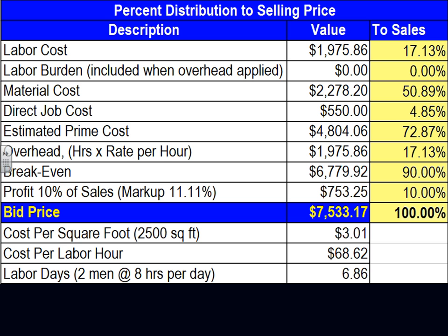So, Zach, my friend, if you look at your labor cost, it's 17% for this project. Every project that you guys do, it's 10%, and this project is 17%. What have you done different? Did you hire illegal immigrants to do that, or what? So that's 17%. Labor burden, material cost is 50%, guys. Why is it 50% when every hospital we have done is 40%? These are flags for your boss to look at.